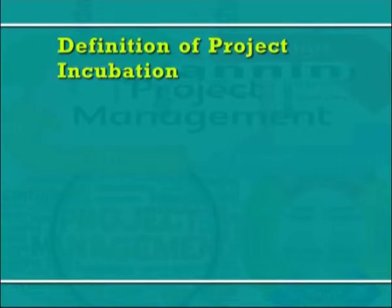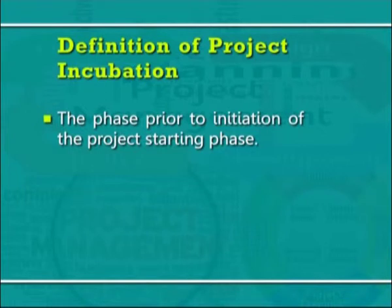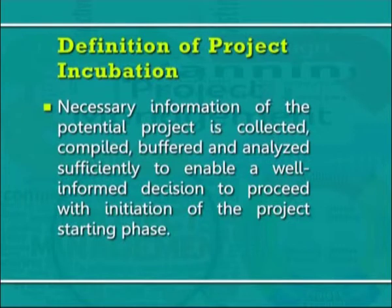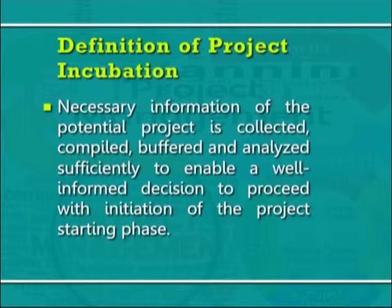Definition of project incubation feasibility phase — the project incubation feasibility phase in the comprehensive project life cycle is the phase prior to initiation of the project starting phase. During this period, necessary information of the potential project is collected, compiled, buffered and analyzed sufficiently to enable a well-informed decision to proceed with initiation of the project starting phase. The time required for this project feasibility phase will vary from a few days to months depending on the nature of the industry.